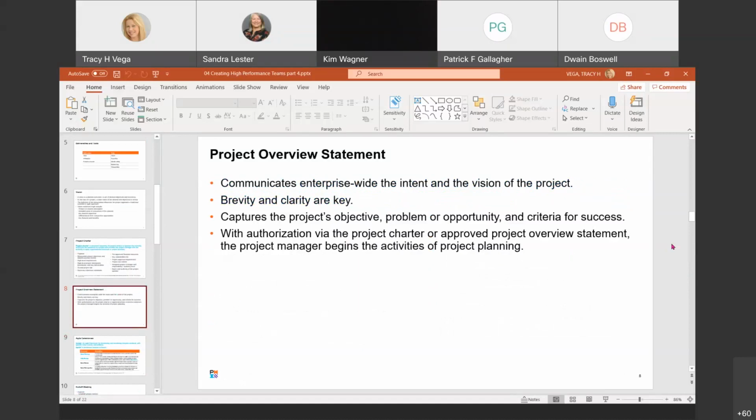All right, let's keep going forward on this. The project charter also establishes the relationship between the requesting organization and the performing organization. The initial agreement will typically provide a formal contract to start the project. The charter validates the alignment of the project to the organizational strategy, but it's not considered part of the actual contract. For internal projects, you still want to have a project charter to ensure proper delivery, even if it's internal.